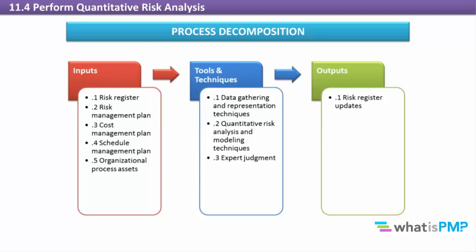Quantitative analysis will be repeated as new risks are identified or as it's deemed necessary for other identified risks. For project level risk analysis, quantitative will reoccur frequently during risk monitoring and control to keep tabs on whether the project's overall risk level has changed.